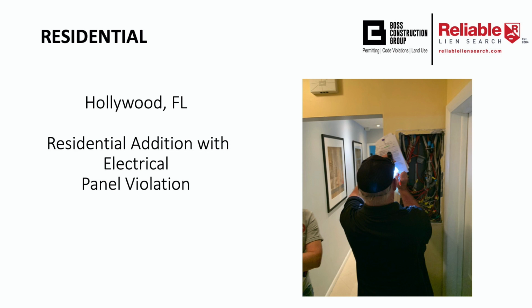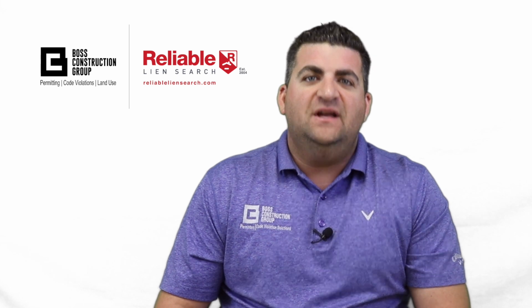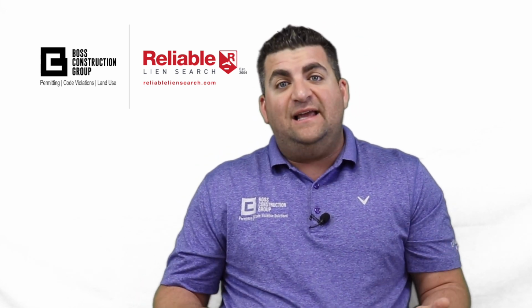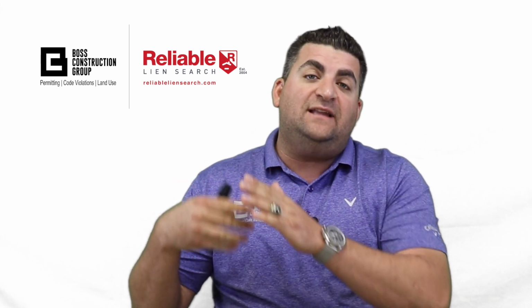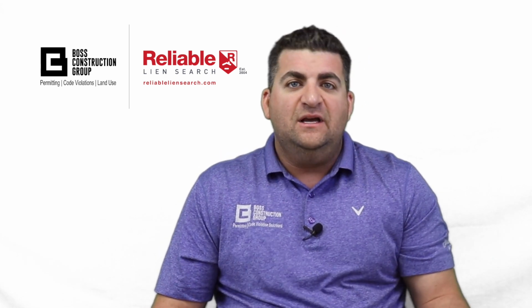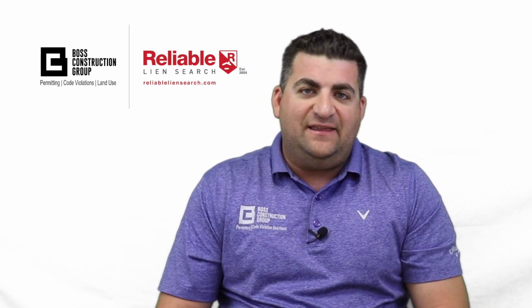This was an open permit from 2013. I helped the Romanos close their window permit and their addition permit, and they weren't looking to sell their house. They wanted to do something else. They wanted to put a kitchen in their house. The City of Hollywood, like many cities, says we're not going to let you pull a new permit until you satisfy your old permit requirements. So these guys knew that before they worked on their kitchen, they had to satisfy that addition.